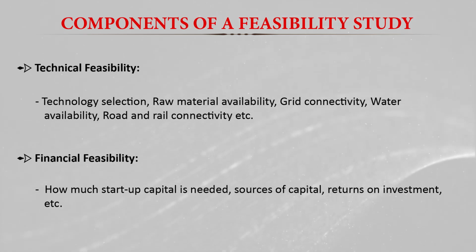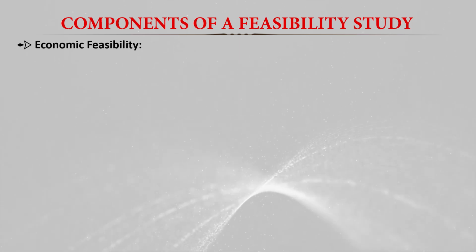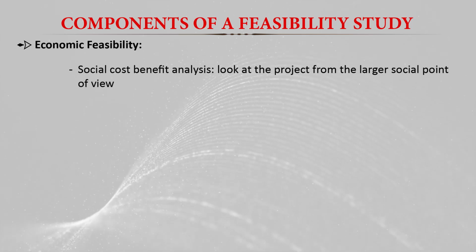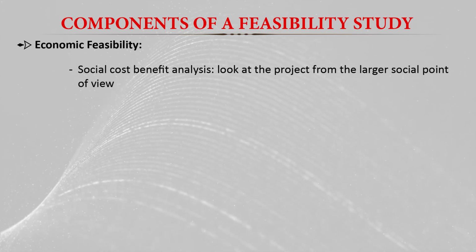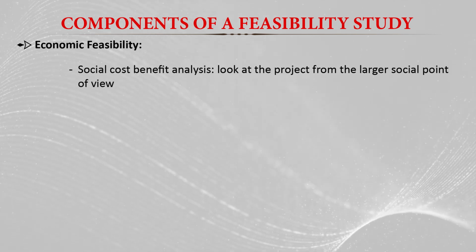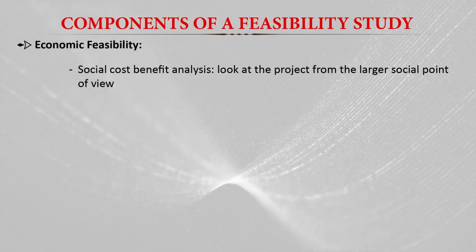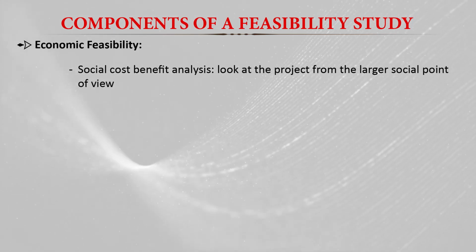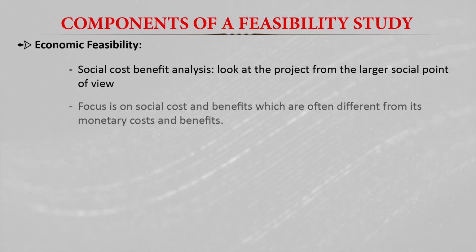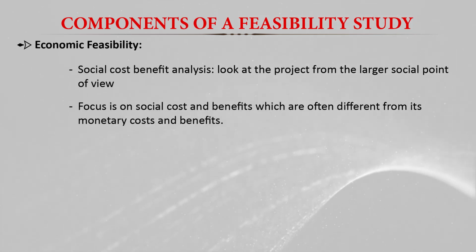Then we have to mention the economic feasibility. Not only the financial, we have to mention the economic feasibility, and we do social cost benefit analysis. We have to look at the project from the larger social point of view, sometimes the total country perspective, nation perspective or community perspective. We have to analyze the proposed project, and here the focus is on the social cost and benefit, which are often different from its monetary cost and benefit.